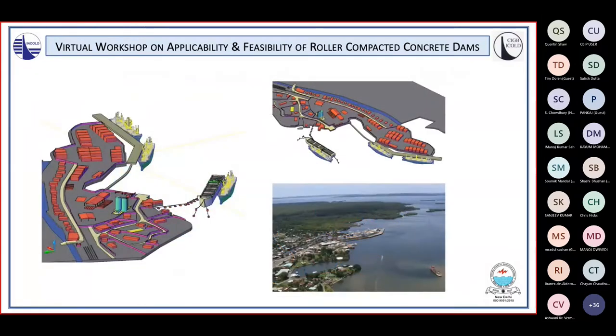A complete BIM model of the existing port facilities was created to show how the planned temporary shore-based bulk materials handling infrastructure would be located and interact with the existing facilities. The BIM model was also used in community meetings to explain the planning and operation of the facility to obtain community input and address concerns. The BIM model was also used for submission to the Panama Canal Authority for permit approval.